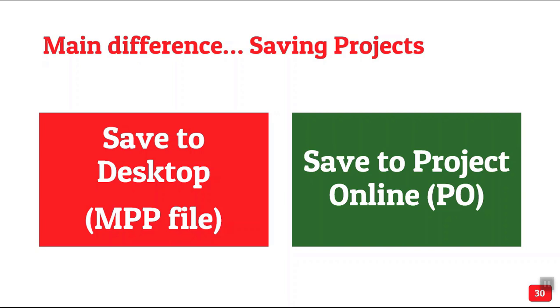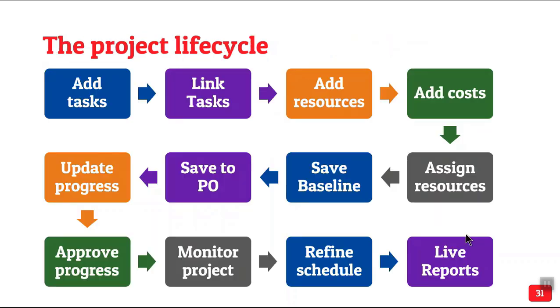So I am going to show you the main difference between just using Microsoft Project and using Project with Project Online. The primary difference comes as to where you save the files. Typically, we save files to desktop and each file is independent. They don't understand each other. So consolidation is your responsibility. Whereas when you save it on Project, what happens? This is not your responsibility. You save the file directly to Project Online. There is no local file available.